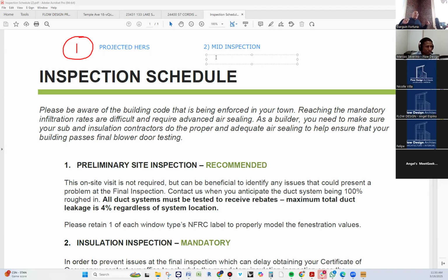They also go into the attic and they check the depth of the insulation in the roof, if there is any. So they've got to have access to that. They check all of that stuff, make sure that everything is good. At that point, they also check windows, because you cannot pass rough plumbing, electrical, and framing if you don't have the windows installed, because water will get in, right? That's a problem. So they will check if the windows are as per the specifications that we require.